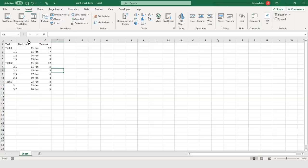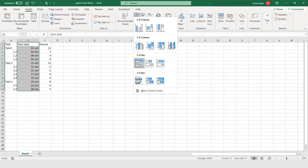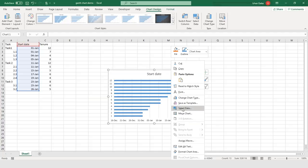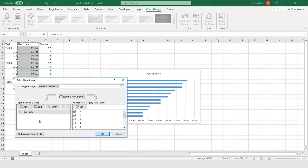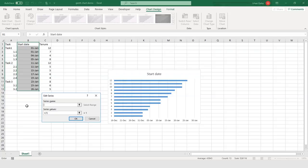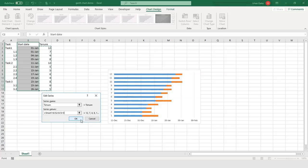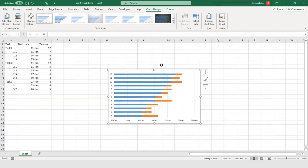In the second step, we will select the entire second column. After selecting this column, we will go to the Insert tab. In the Insert tab, we will go to Bar charts and select 2D Stacked Bar Charts. Now we have the bar chart in accordance with our data on the screen. Then comes the third step — we will add the duration of the tasks to the bar graph. We will click on the chart and select the Select Data option. In the Select Data Source dialog box, we find the start date is already there. We will click on Add, and in the Series Name section we will put 'tenure'. Then in the Series Values, we will select the entire tenure series and click on OK. This bar graph now has two colors — orange and blue — and includes the duration of all the tasks in our project table.